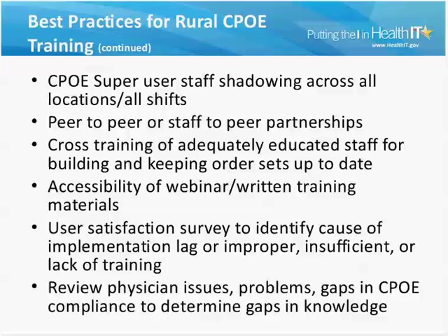In almost every go live that I've been a part of, your super user staff is identified via some sort of highly visible T-shirt, maybe a bright red, bright orange T-shirt. Could be a special badge that they have. It could be an actual list at nursing stations of who is the super user on call for that time. Anything that we can do to make it very, very easy for everyone involved to find in rapid order that person who can give them the help.